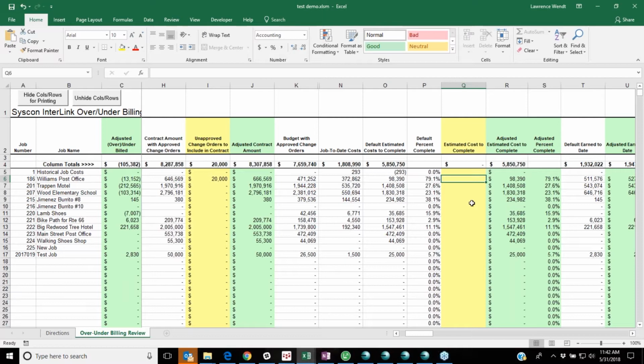this job? And so the project manager may look at it and say, hey, I need a crew for 6 weeks. I need a crane. I have a little bit of materials left to go. I have a subcontractor that I'm going to still pay 10 grand. I'm going to say it's going to cost us $50,000 to finish that.